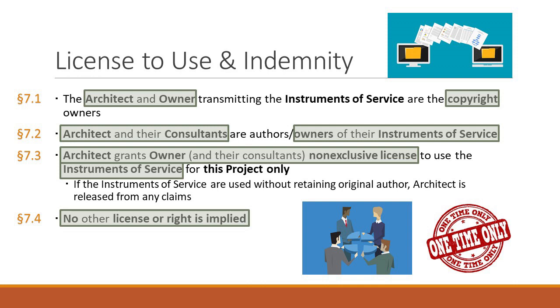So it goes to a jury, and the jury says, okay, it's a $1 million loss, and they apportion the fault. They say $200,000 is the owner's fault, and $800,000 is the architect's fault because they designed it and the wall fell down on what they designed. Because of this provision of indemnifying and holding harmless, the owner has to pay the full $1 million. The architect doesn't have to pay anything because the owner didn't bring in the architect. And the owner couldn't let the architect protect itself against third parties, and so the owner has to indemnify the architect for these third-party claims.